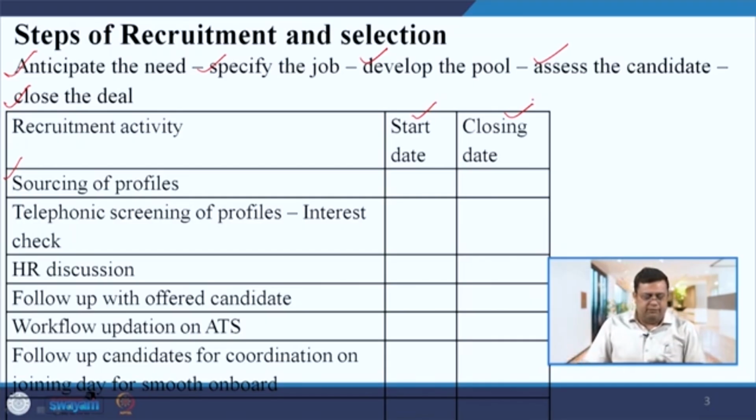If you do not have this Gantt chart, then it may be difficult for you to recall every activity and how much time was taken. So, in order to maintain the record, you can make a record of all activities and when each was started and closed, because it will help you to analyze in which step more time was taken and how you can plan that particular step better in the future.